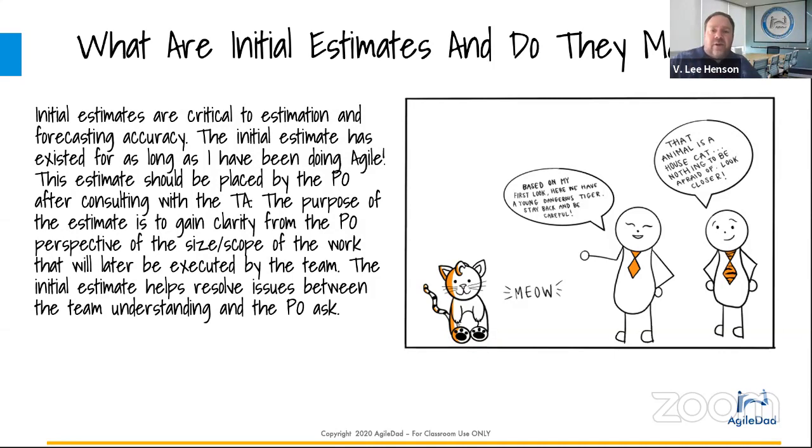Someone else asked, how do we determine how many points a team can do inside of a sprint? Is it based on historical data? If we have historical data, we can certainly use historical data. However, it's not always the most accurate. What we find is that as the scope of the work changes, sometimes if we're using historical data, the team's skill set may be different building a house than it is building a car, right? And I know those are two things you'd never build, but the work could be totally different. So sometimes you need to readdress that benchmark or that baseline. And if you consistently readdress the baseline or benchmark for small, what will happen is over time, the team will become predictable, because you'll be able to figure out how many units of work they could do.